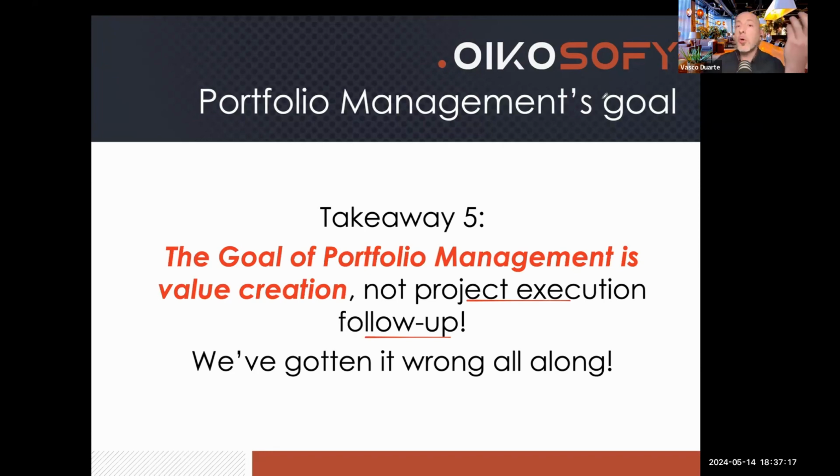So in the no estimates work, I've already tackled how you deliver on time. The short of it is, you deliver way ahead of the time you think you need to, because otherwise you're going to be late, period. Because the work always expands to fill the available time. I call this the Christmas problem. Let's say we start today, mid-May, we start the project. We need to deliver in Christmas. How do you make sure you deliver in Christmas?